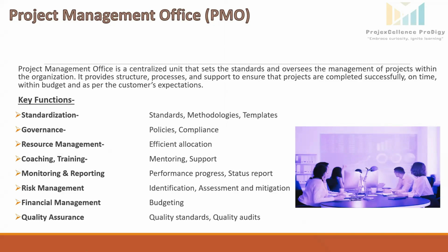Coaching and training. PMO provides training programs, mentoring, and support for project managers and team members. For example, PMO offers the PMP certification or any kind of skill development training, behavioral training, or professional development workshops. Monitoring and reporting. PMO tracks project performance and progress. It provides regular status reports to the stakeholders. It implements a project dashboard or Kanban board to visualize the project status, milestones, and the potential risks.